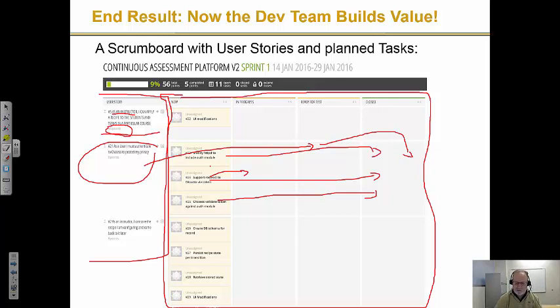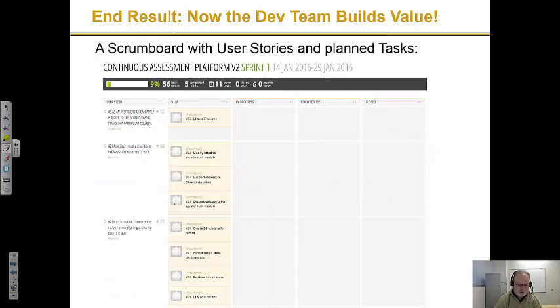So there's a difference here. Remember we talked a little bit about task activity networks and traditional project planning. In traditional project planning, the project manager, perhaps with a tech lead type of person, tries to go through and create all these tasks and order them and put them on a very fixed schedule and time frame when they're supposed to be done. That doesn't happen here.